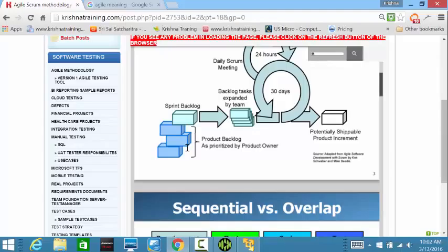So if you take a look at sprint 1, there will not be that much work for the QA people. There are 2 QA people, and both are involved in the discussions, documentation, testing and test planning. The work might not be that much for the 2 people in one sprint. Now when the second sprint comes in, probably one person gets allocated to the testing of user story 1, and another person would be involved in the documentation, test plan and test cases of user story 2.